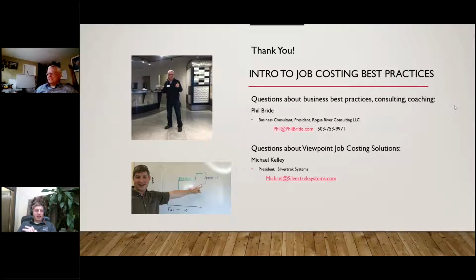Right away. And I can tell you from the software side, most job costing systems, especially the ones that we help with, Pro Contractor, Spectrum, and Vista by Viewpoint, all three owned by Viewpoint out of Portland, have the ability to show the cost impact and the revenue impact of a change order, and keep it in a pending state until it's signed.